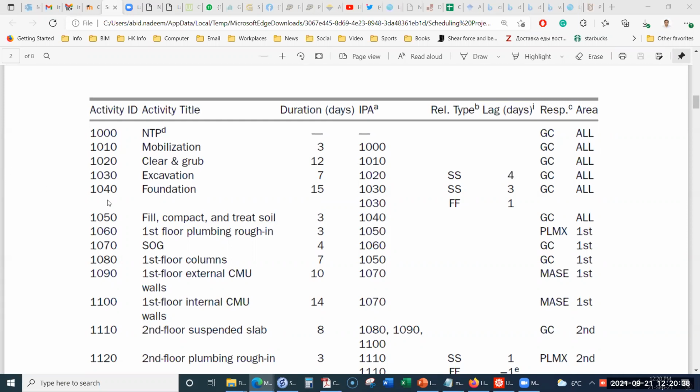By contiguous activity, the meaning is that once this excavation has started, you will work continuously for the duration of the activity. There will be no stopping in between. Although this stopping and then starting of the activity can be done, for this I think we will have to do it manually in the project, and that will complicate the issue. So for simplification as of now, because we are just starting to learn it, it is better to assume contiguous.